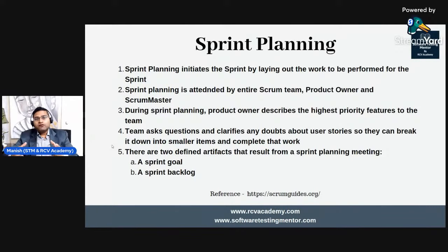So the sprint goal for that sprint could be to ensure that the login functionality has been successfully implemented and working fine, right? So some sort of statement and a goal needs to be mentioned about what we are trying to achieve in that particular sprint. So that's the sprint goal. That's a statement that needs to be mentioned as part of the sprint planning meeting as well. What we are trying to achieve as a team, right? And it's not a single person, it's actually the whole team that agrees to that goal.